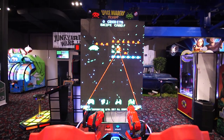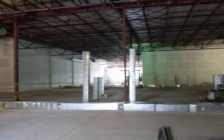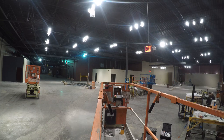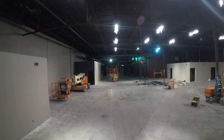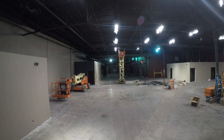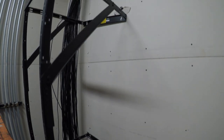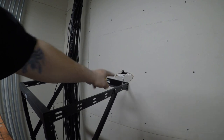This is a wrap-up video for our Revved Up Fun project. We started at ground zero, getting in at the very beginning with everything raw, waiting for the HVAC people to start. The way you do a project like this is we start with the general contractor, coordinate all the times, and worked in shifts and off hours to share the man lifts with the other electrical contractors. This allowed us to save the client money instead of renting our own at the same time the electrical people are working.